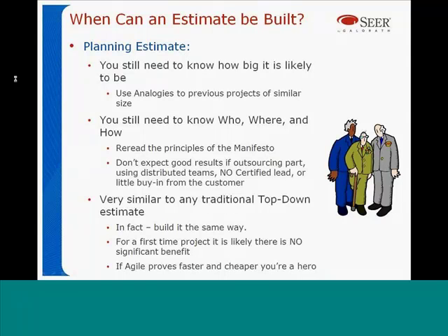In fact, what you really want to do is build it exactly the same way. And if this is the first time you're ever doing Agile, I really wouldn't expect that you're going to see a real significant benefit in your estimate at the planning estimate stage. Now, you know that it's been prophesized and proven that Agile can provide you faster and somewhat cheaper, less effort type projects. But for your first time going through the process, it's probably not going to pan out that you're going to see those benefits until you've done Agile on 2 or 3 different programs.